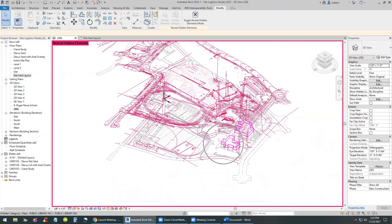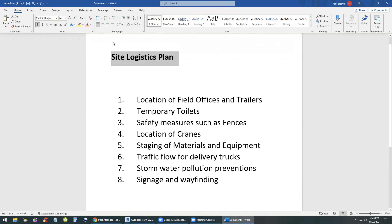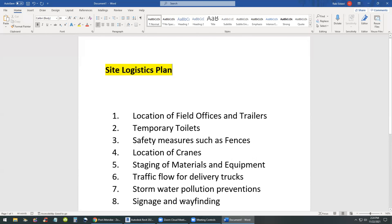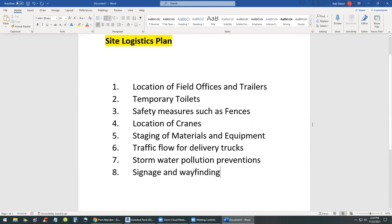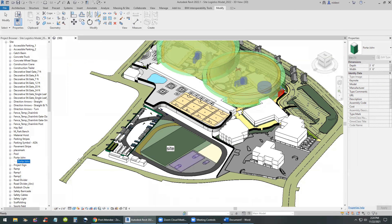We're checking out the site yard layout, which is a floor plan layout of the site, so you can work in both 3D or 2D. I have a document that shows eight requirements for what needs to go on a site logistics plan: location of field offices and trailers, temporary toilets, safety measures such as fences, location of cranes, staging materials and equipment, traffic flow for trucks, stormwater pollution measures, and so on.